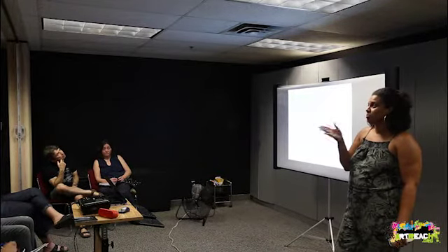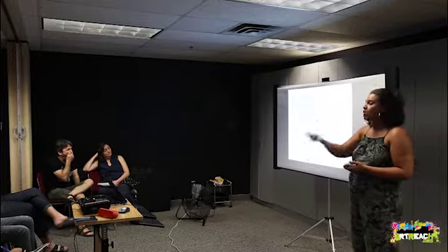In a small project, you might say, we want to change this paint from red to blue. Okay, that's easy. But if that example was in a larger corporation, we'd have to take it all the way up to the change control committee. They're going to decide, and then they're going to pass it down. It can be a big process. So that's what this is setting you up for: how changes can happen in the project, how that's monitored, and how it's authorized. Red to blue paint is one thing, but when you're dealing with millions of dollars, a slight change can make a huge difference in your project, and you have to make sure everybody's on board.